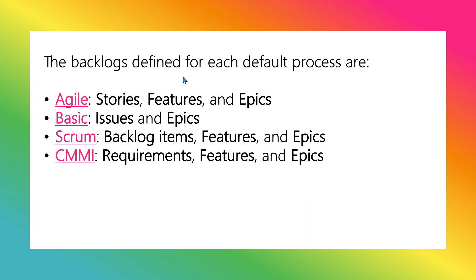Backlogs are defined for each default process. There are different kinds of backlog items defined for each methodology. If you are working on Agile, there are stories, features, and epics. If you are using Basic, it will be issues and epics. If you are working on Scrum, you will have backlog items, features, and epics. If you are working on CMMI methodology, you have requirements, features, and epics. There are also options to customize these.